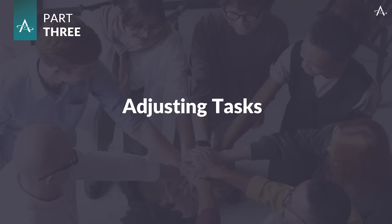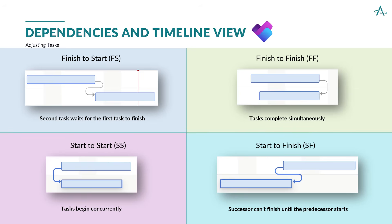Adjusting tasks in Planner Premium isn't just about moving a due date — it's about adapting to change in a structured way. Planner Premium gives you the flexibility to update assignments, shift timelines, modify dependencies, and track the impact in real time. Dependencies control when tasks start or finish based on other tasks. Finish to start is the most common, but Planner Premium allows the use of all four dependency types, giving clarity on how the timeline is structured and how changes can ripple across the project.